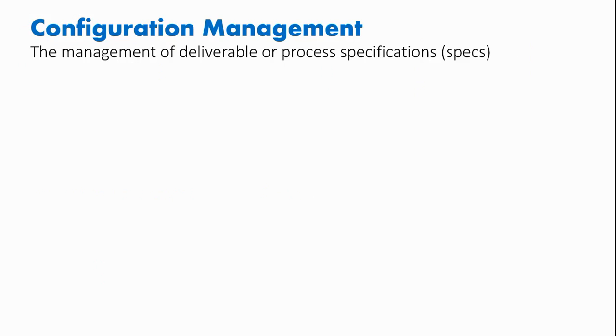When you think about configuration management, think about the management of deliverable or process specifications. In other words, specs. Think about the management of these specs that have been identified as things that the deliverable must have or should have to achieve the customer's acceptance or the stakeholders' acceptance of that final product, service, or result. So in configuration management, you are focused on the management of these specs.